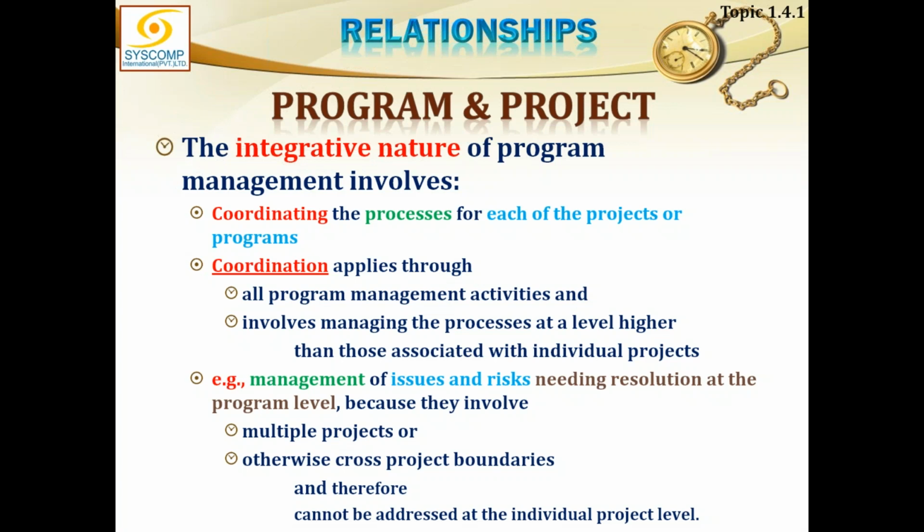For example, management of issues and risk needing resolution at the program level because they involve multiple projects or otherwise cross project boundaries and therefore cannot be addressed at the individual project level.